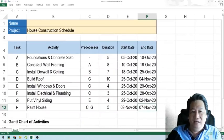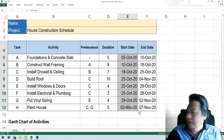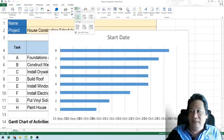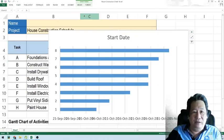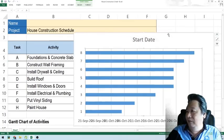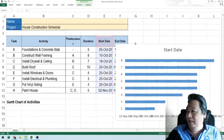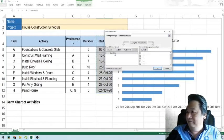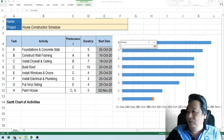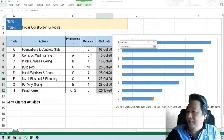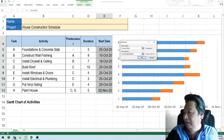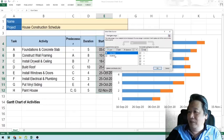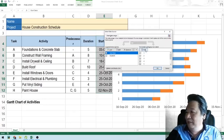Now we will construct the Gantt chart. We highlight the start date, click Insert, and we don't use the regular bar chart — we use the stacked bar chart (horizontal). We make it smaller, then we add the duration: select data, add a series name called 'Duration', enter, and add the duration data.